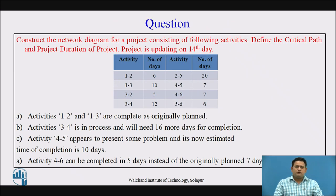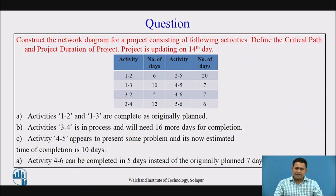Here is a question in which we are observing activities with their days. The table shows the activities, durations, and descriptions presenting the present conditions and data of all activities in the project. Activities 1-2 and 1-3 are completed as originally planned. Activity 3-4 is in progress and will need 6 more days for completion. Activity 4-5 appears to present some problems and its estimated time of completion is 10 days, while activity 4-6 can be completed in 5 days instead of the originally planned 7 days.